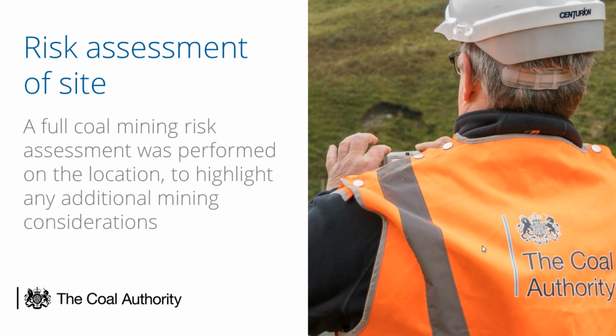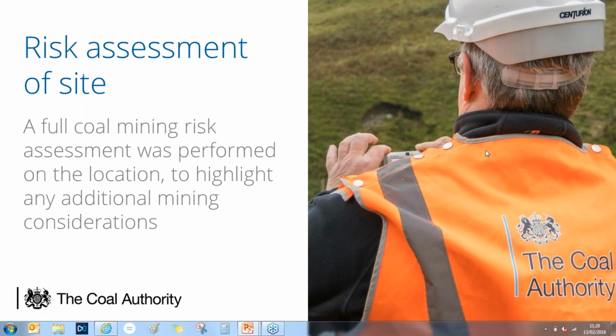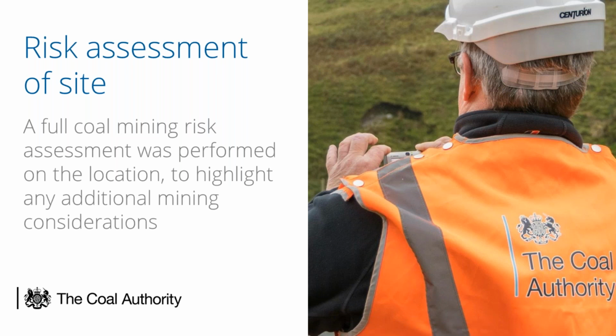So what we did on this site was a series of trial trenches to expose the outcrop. We did find it and prove it. That enabled us to plan the construction. To address the issues of potential shallow mining, we overdug that area and recompacted it.